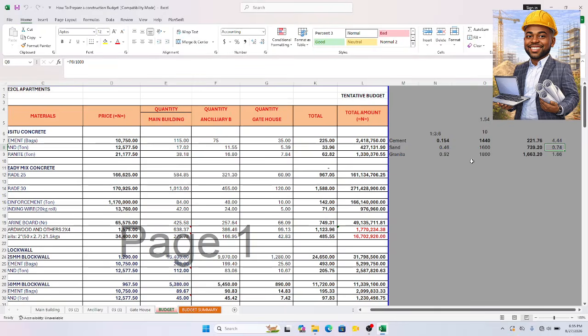Now, granite is 6 over 10 times 1.54. That gives us 0.92 cubic meter, of course. Now, if I multiply by the density, between 1.7 and 1.9. If I use 1.7, I'll still have more than adequate to do what I want to do. So we'll just use in between, 1.8 as an average. So we have this. So I have 1.66.